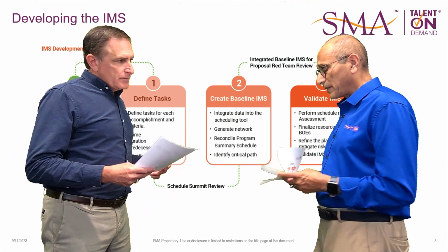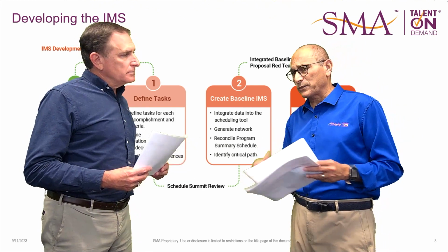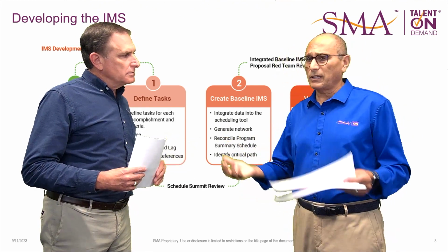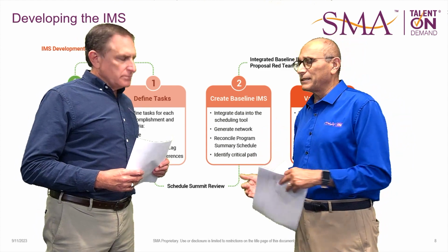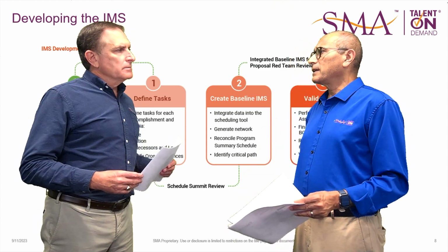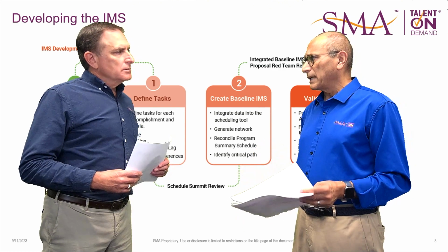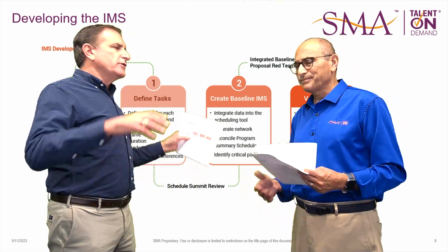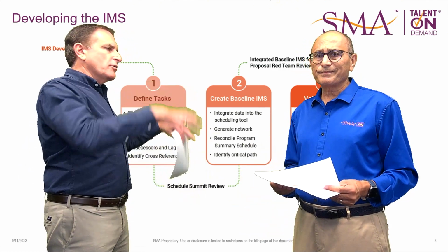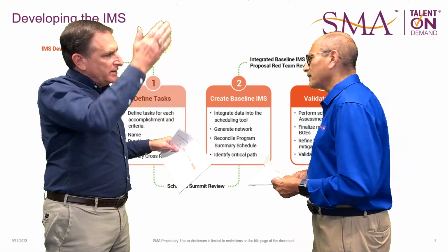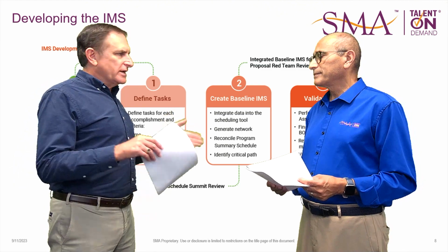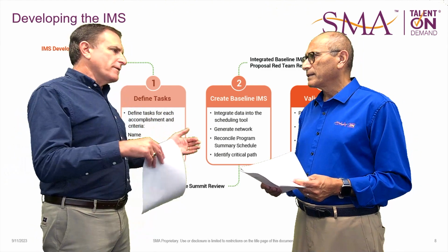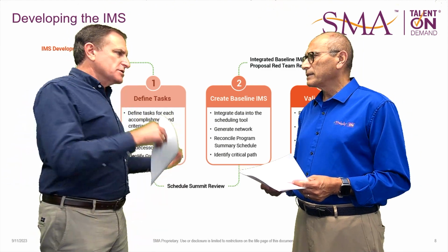And that's something which I think people have to get used to, because usually people have natural tendencies to think about the logic as you think about the task, and you define the necessary tasks based on logic. Instead, think about all the activities and have a good sense of what those are, and then think about the logic. Exactly. And if you take that one step further and break it down by the IPTs that are occurring in that segment, you're not trying to eat the elephant all in one bite. You're taking it in small segments. You think about what things your subs need to provide you as far as schedules.